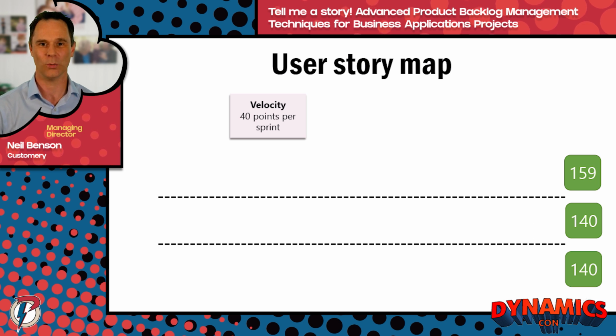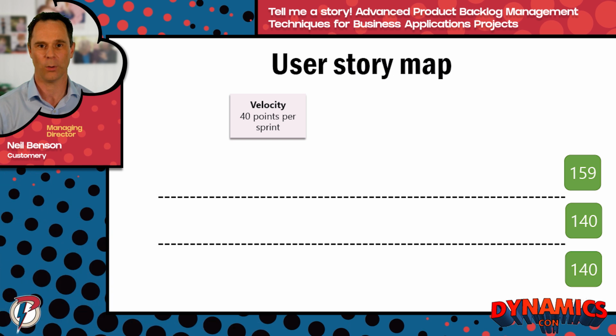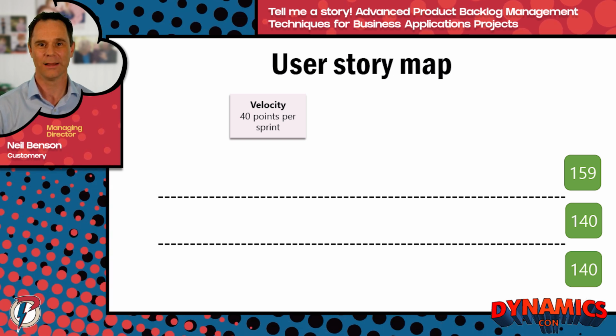Now we need to make two assumptions. First, the development team will need to guesstimate its initial velocity. Velocity is a measure of how much work the team can get done in a time-boxed period, called a sprint. Often a sprint is 2 weeks, but it can be up to 1 month. We're estimating work in story points, so velocity is estimated as story points per sprint. Team Superhero has estimated they can get 40 points done in each 2-week sprint.